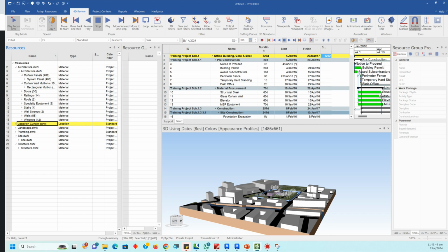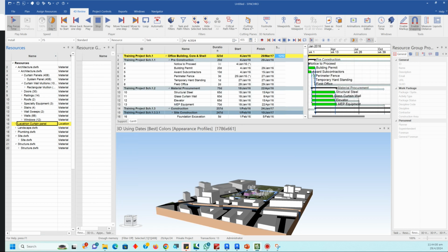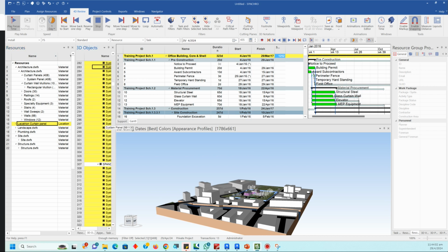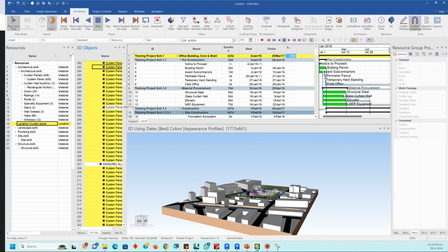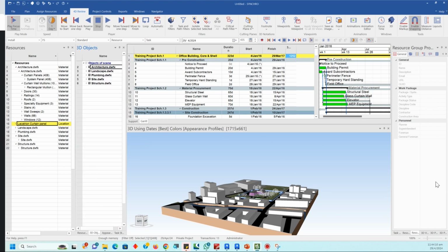In order to assign it to the task, we need to create resources. Without creating resources, we can't assign to the tasks. A 3D geometry is only a representation; unless it becomes a resource, it cannot be added to a task, right? Yes.